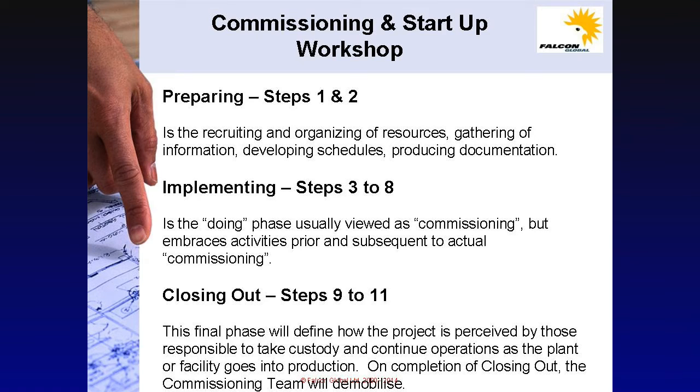Closing out, steps 9 to 11. This final phase will define how the project is perceived by those responsible to take custody and continue operations as the plant or facility goes into production. On completion of closing out, the commissioning team will demobilize.